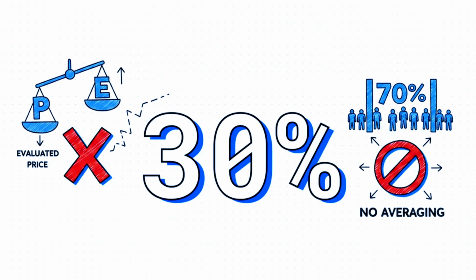For example, if your like-for-like cost estimate is 100 million rupees, any bid evaluated strictly below 70 million rupees is out, and it is vital to remember this. ITB 35.2 dictates mandatory rejection before any averaging takes place. You never, ever let an abnormally low bid drag down your overall average.